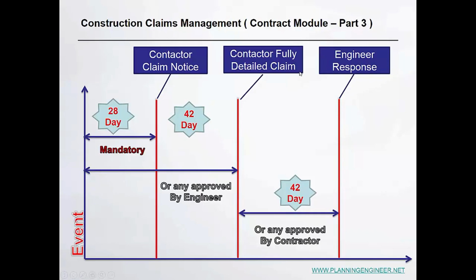And please be careful here, because if you don't have the claim details fully, you should notify the client or the employer that the details are not available because of 1, 2, 3, 4, 5, and they should be submitted when they are available.